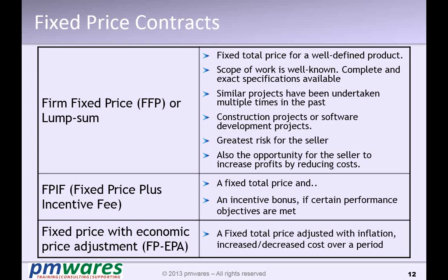How does it help? My objective is to achieve this within 6 months. If I give an incentive, the vendor's objective will also become to deliver it within 6 months. Or he aspires to do that, is inclined to do that.